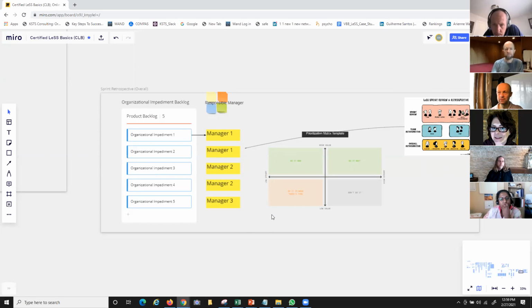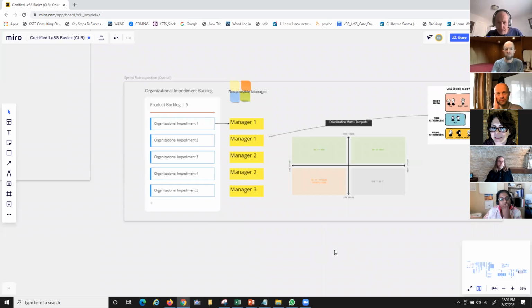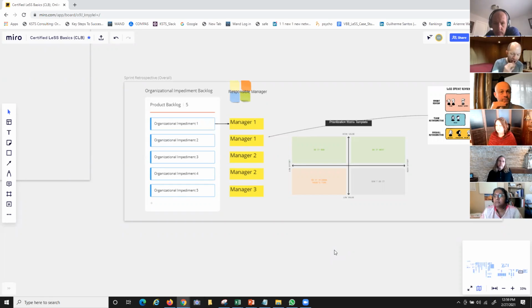If you want to talk about transparency, this is an example of how to do it. Simple. It's the concept of an inverted organization that we recommend in LeSS. In the traditional organization, senior management sees what individuals are talking about and what they do, but not the other way around. Here we have a slightly different concept. We have individual teams doing their own private team retrospectives, but if managers take responsibility for any action, the rest of the organization should be able to see.